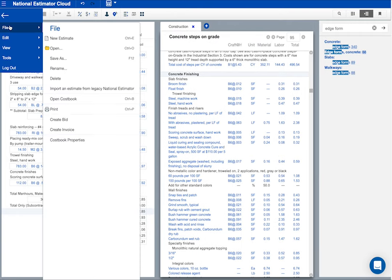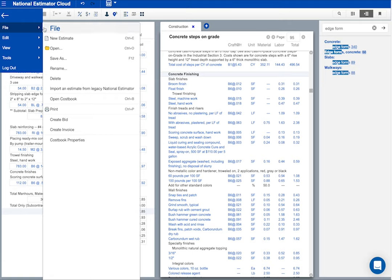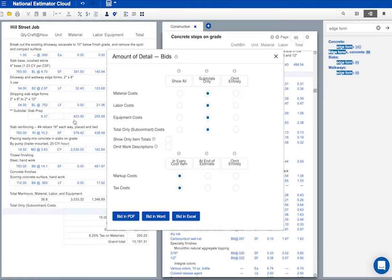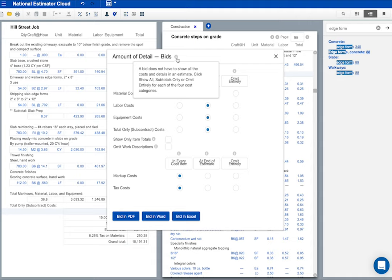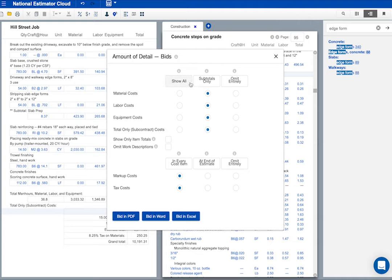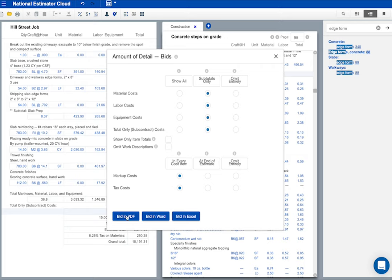Here's how I print bids. The info icon explains the options. My bid for the Hill Street job doesn't have to show all the costs and details in my estimate. For this job, I'll show all the work descriptions, but only subtotal costs. And I'll distribute markup and tax throughout the estimate so I don't have to show either in the bid. I could print the bid in Word or Excel, but let's have a look at the bid as a PDF.